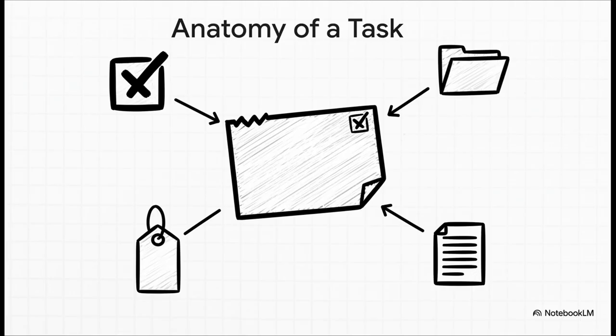And the format for each task? Oh, it's just as precise. It's literally like a single step in a recipe. Every task gets an ID, a super clear description of what to do, and even tells you the exact file you need to work on. There is no ambiguity. Create this specific thing in this specific place.